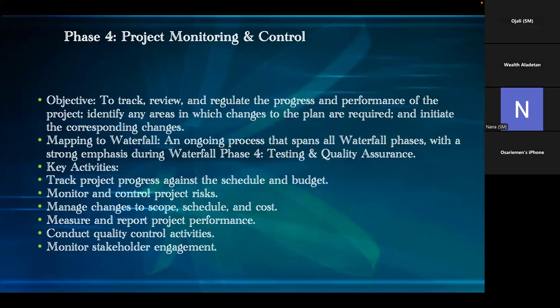With the migration, you move from this legacy system to this, and then the decommissioning. So you need to understand which one comes first before you decommission. There are some initiation parts that need to be done before you start going into decommissioning. And the data that you're moving, you need to know how to segregate those data, archive those data. All those are phases that you need to understand first, and then you carry them out one after the other. So that you can do with waterfall. Even with this teaching now, I can elaborate more on that project. Yeah, thank you. Once you have an understanding of both, it makes you a master.